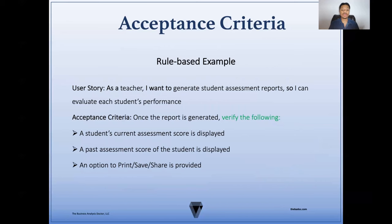Here's an example of rule-based acceptance criteria. For the user story 'as a teacher, I want to generate student assessment reports so that I can evaluate each student's performance,' the acceptance criteria might be: once the report is generated, verify the following — verify a student's current assessment score is displayed; verify that a past assessment score of the student is displayed; and verify that an option to print, save, or share is provided.